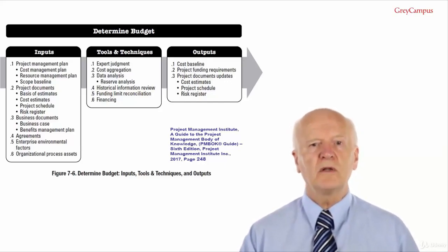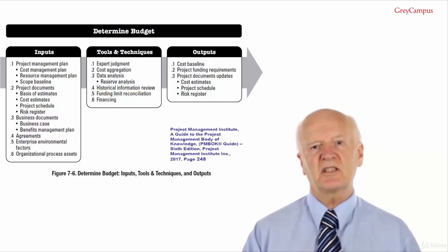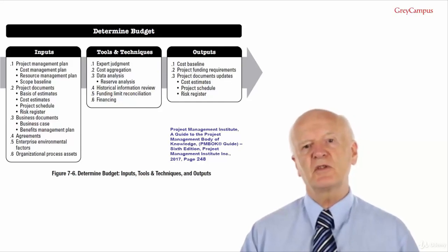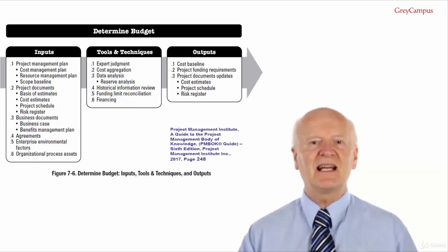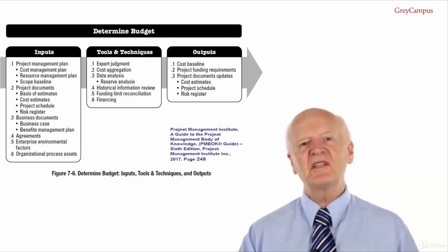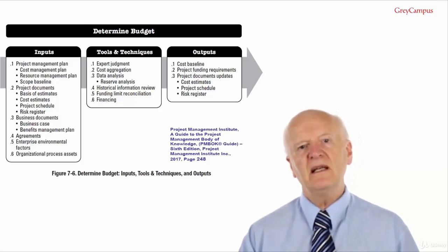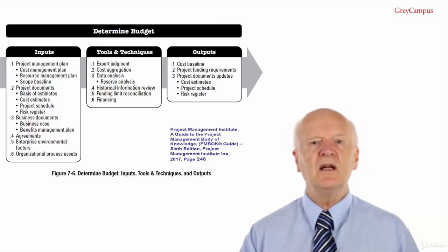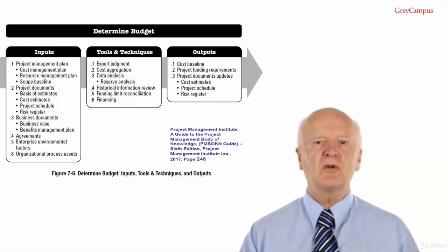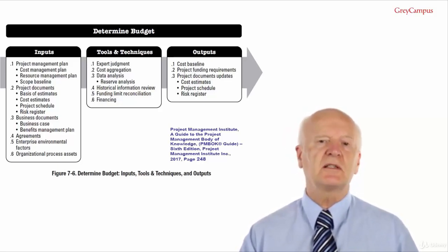For example, one model of software development uses multiple separate adjustive factors, each one of which has numerous points within it, which is meaningless gobbledygook, but just take it that some types of estimating can be very complex. Both the cost and accuracy of the analysis and parametric models can vary widely, but are most likely to be reliable when historical information used to develop the model is accurate, parameters used in the model are readily quantifiable, and models are scalable such that they will work for large projects, small projects or phases of a project.